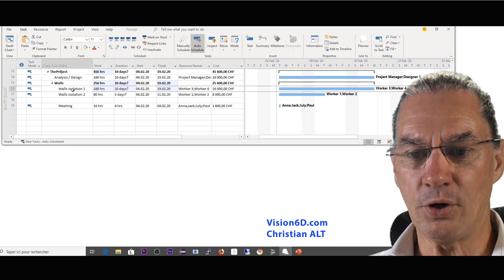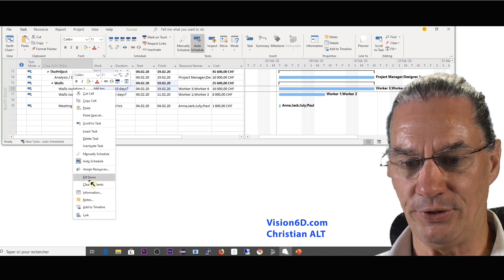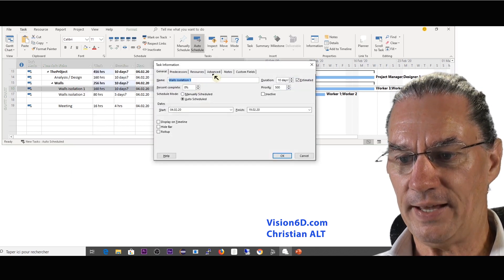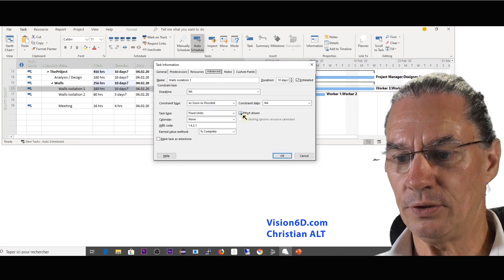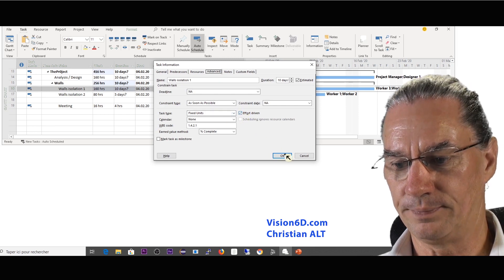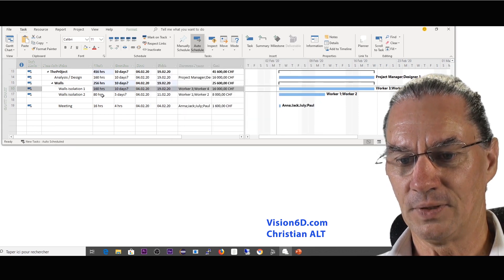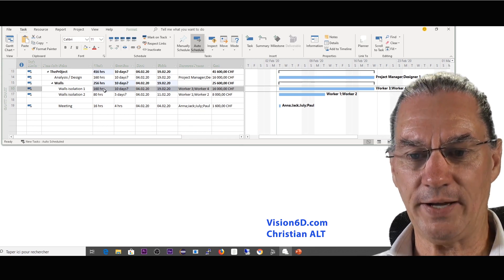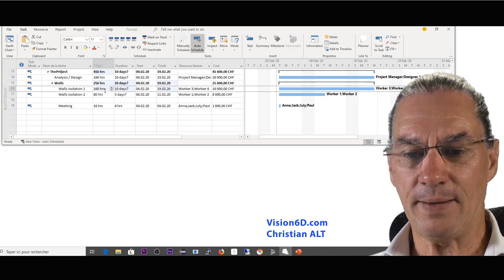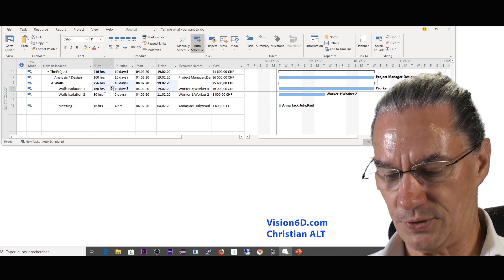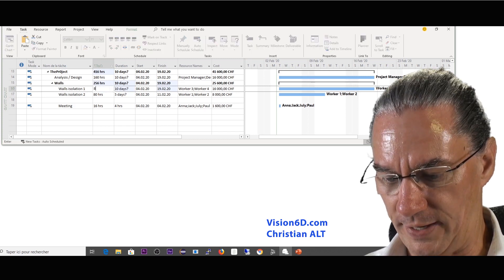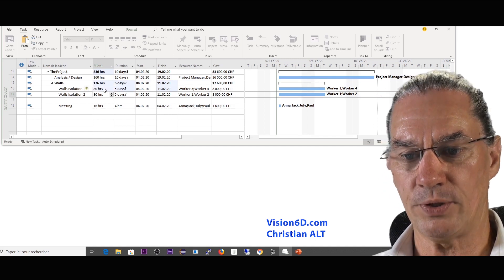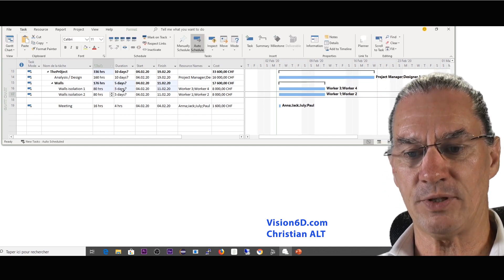So I'm going into the task here, advanced, and I'm going to say that it is effort driven. And you see although I've done that correction here MS Project is not changing this by itself, so I have to do the correction by hand here to put it to 80 hours. And here you see that MS Project has changed it down to five days so here I have to say decrease the duration, yes we agree with this.